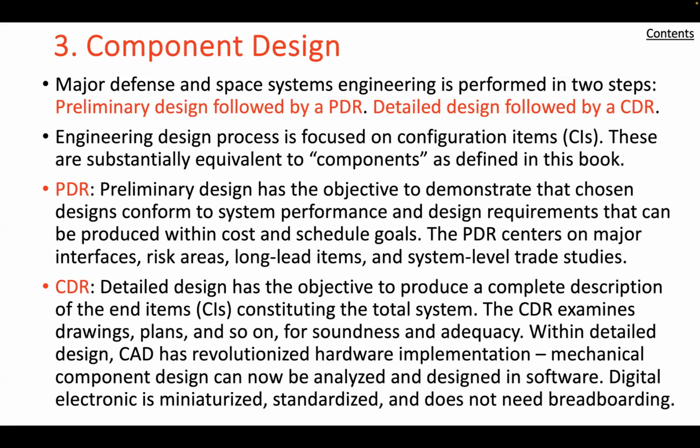As in the case of PDR, system engineering plays a critical role in this process, especially in the review of interfaces and plans for integration and testing. Similarly, internal reviews are necessary prior to the official CDR to ensure that unresolved issues do not arise in the formal sessions. But if they do, system engineering is usually assigned the responsibility of resolving the issues as quickly as possible. The completion of detailed design results in the product baseline.